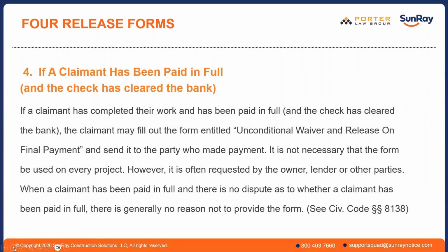Number 4. Now this is certainly for owners and general contractors. If you're a sub, it's the most important of all the forms, and it basically says, okay, we have been paid in full. And once you sign this, you are saying, okay, I've been paid in full. The check has cleared the bank, and we are done. Everything worked out great. I got paid, and basically to the general contractor and the owner, you're saying goodbye. And you're also saying that you're giving up your right to a mechanics lien, or to a stop payment notice, or to a payment bond claim.